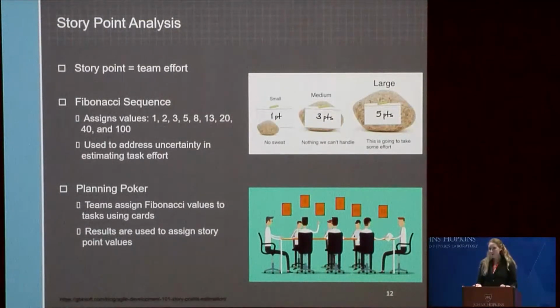The reason this is important is because if I select something very low and you select something very high, you may have additional information about that task that I'm unfamiliar with. And so in order for us to get accuracy in our estimate, we have to collaborate and share that information with each other. It's important to understand that multiple teams may use the method for the same project, but each team may have different definitions for the same number of story points. So my 2 may be different than another team's 2, and that's okay, but we just need to keep that in mind.